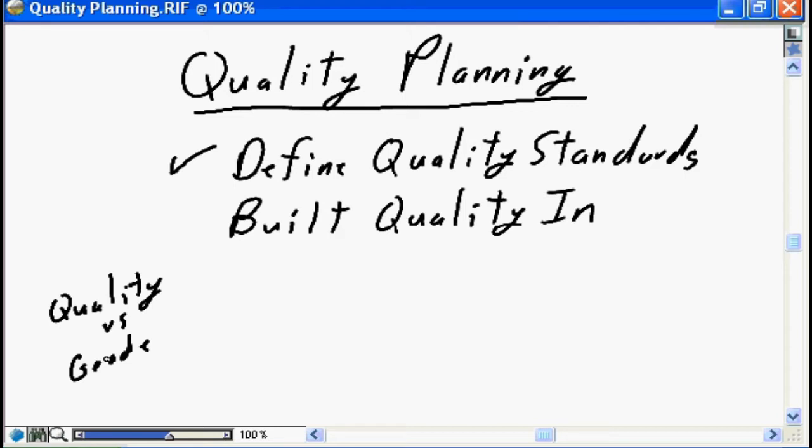Is the project acceptable if it is 100% fault-free? And I would suggest in most projects we deliver in business today, the expectation of 100% fault-free is an unrealistic expectation. Time is money. Time spent on ensuring each and every piece of your project is 100% fault-free is potentially time that is not a good investment for your organization. And as we'll discuss a little later in this nugget, there may be instances where applying an 80-20 rule, applying 80% of your quality process to the 20% of the function that delivers the most business value, may be appropriate.